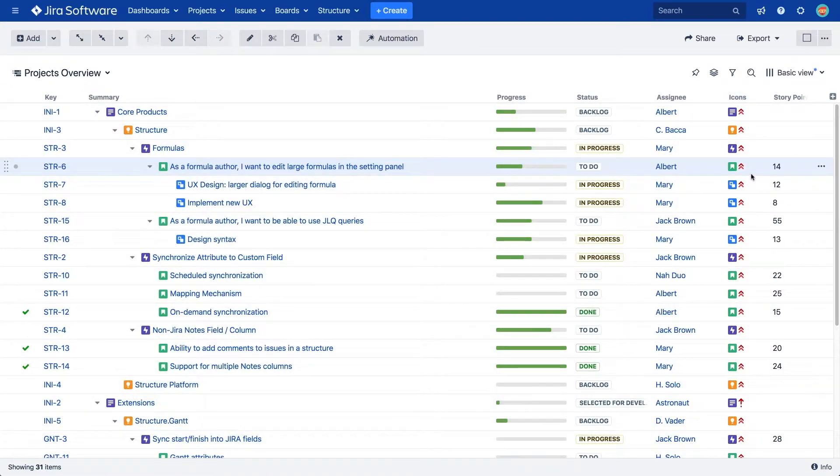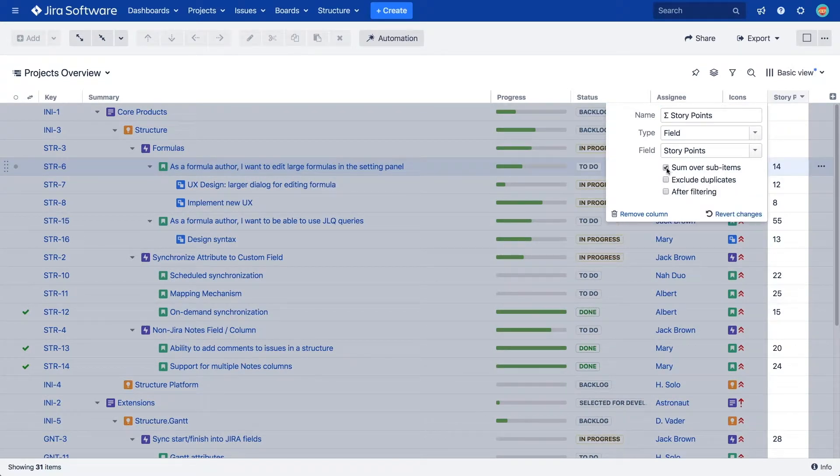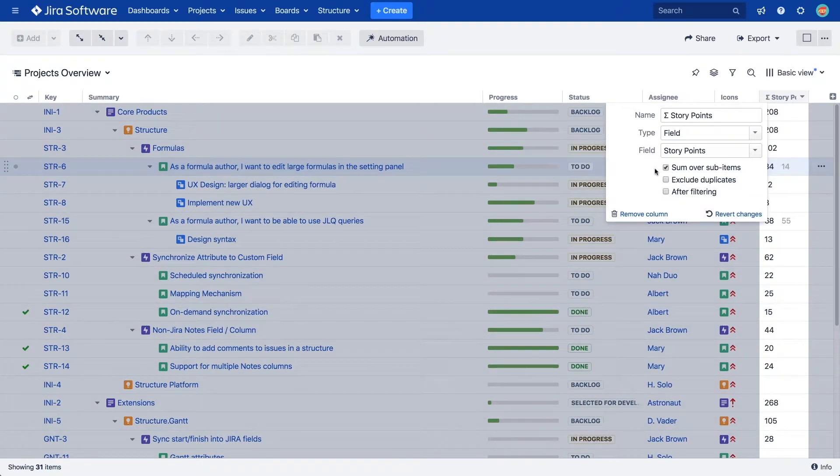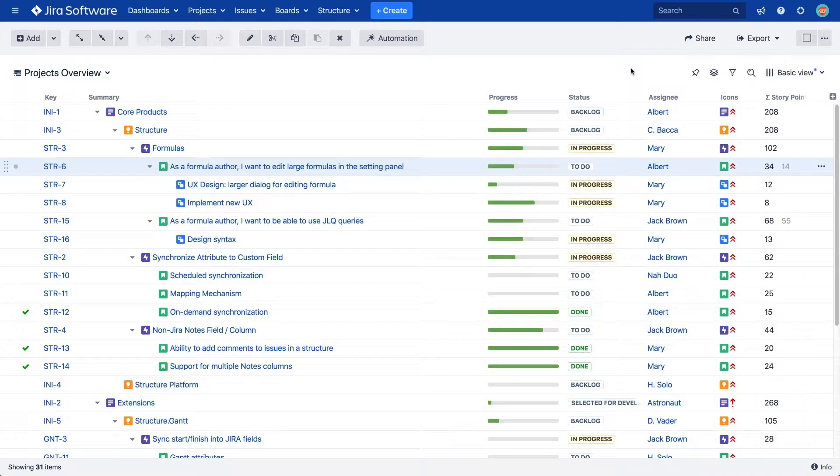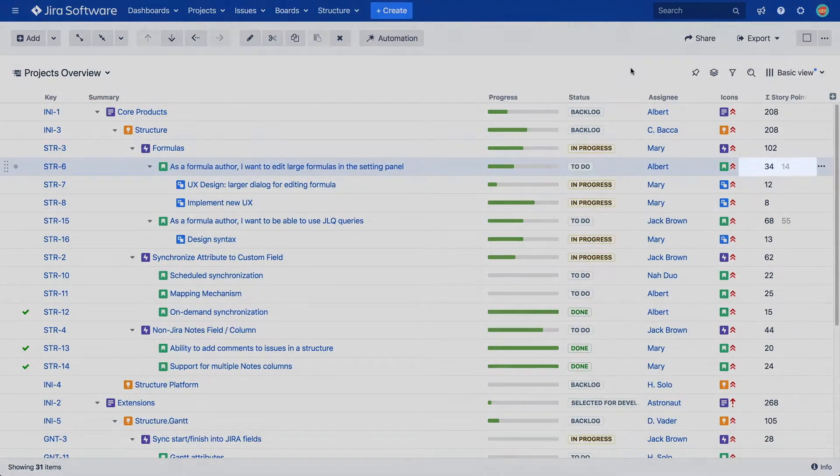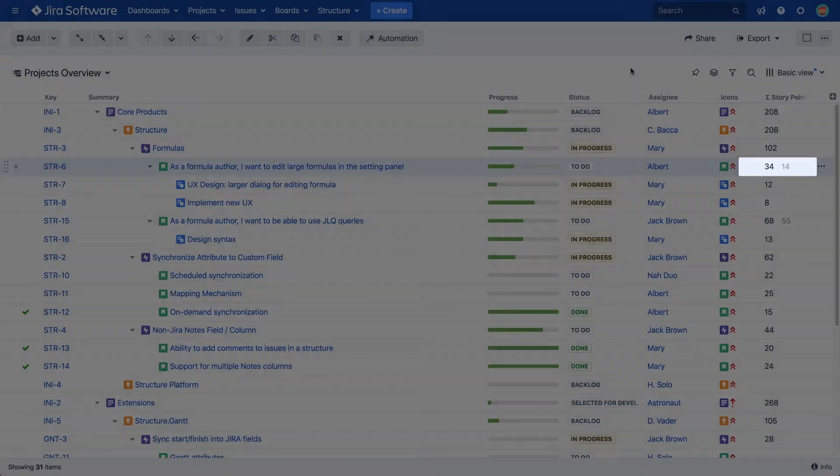As we select the sum over sub-items checkbox, we can see the totals of hierarchies aggregated. If an issue has its own value, it's shown in light gray next to the calculated totals.